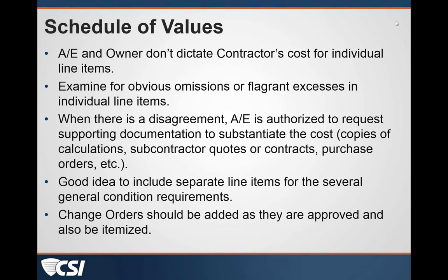We can hear you. I just want to say I endorse what was just being said: if it's through no fault of the contractor, the contractor is probably due some additional cost in addition to an extension of the contract time. And it's not necessarily a foregone conclusion that the contractor just gets an extension of whatever cost he had previously had in the schedule of values. It obviously has to be particular to the circumstances and the situation at the time.